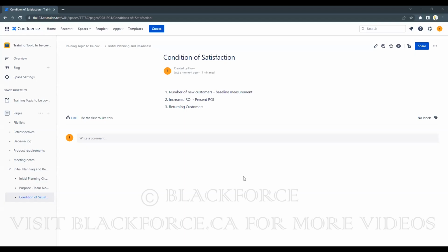You're talking about the sprint definition of done, right? That definition of done is for your sprint, when you want to start working. It's for you to say this story is done, this story must be tested. It must have gone through QA. Or it must have been checked by the product owner, like the user, to say user acceptance testing is done. Those are your definition of done on a story level, and that is the definition of done that is in the Scrum guide.